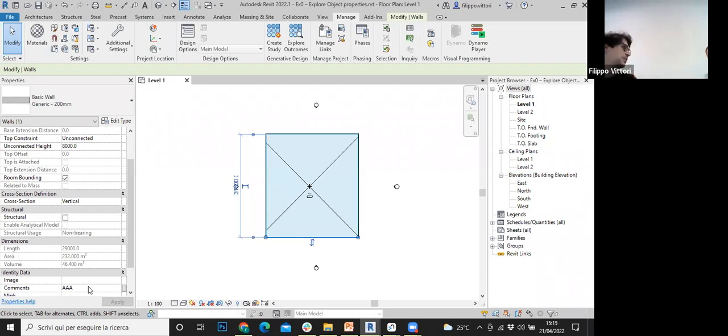Actually, it's pretty good if you do it like this, because people work to insert data, then you query it, and you find the link between the object and the price. I really like it. And you can monitor how much you are spending while the project is growing. So for instance, you can tell the designer, guys, stop with the changes because we are running out of budget.